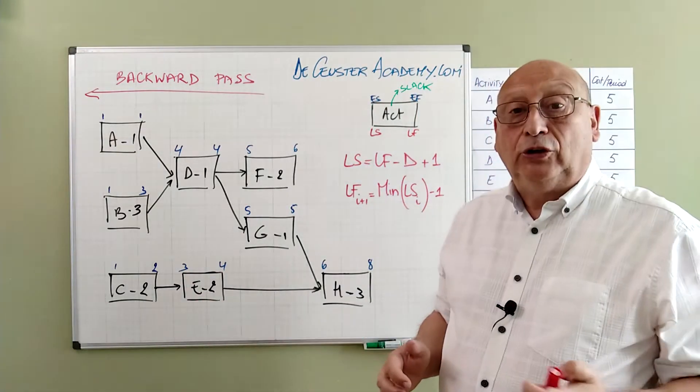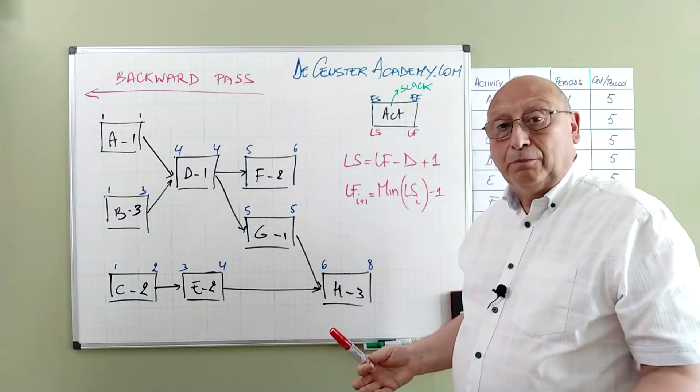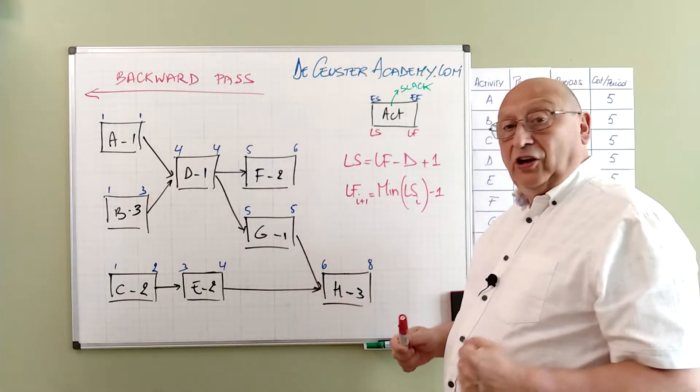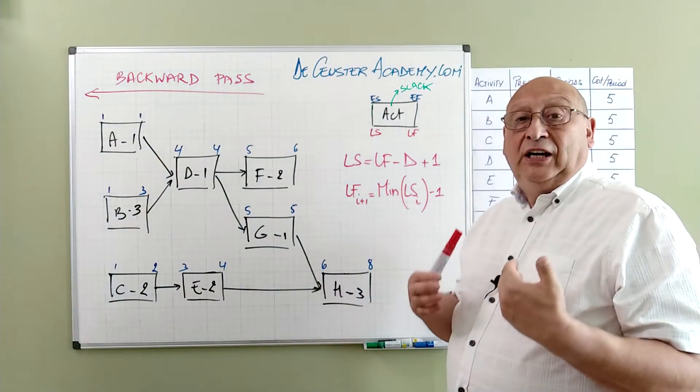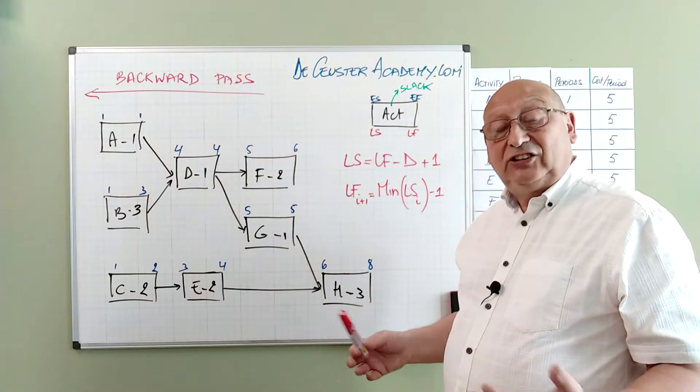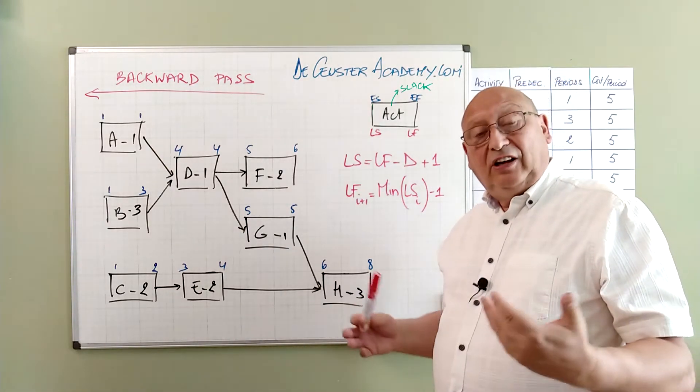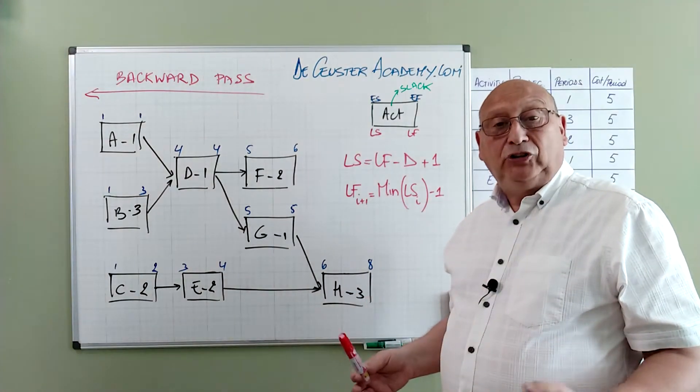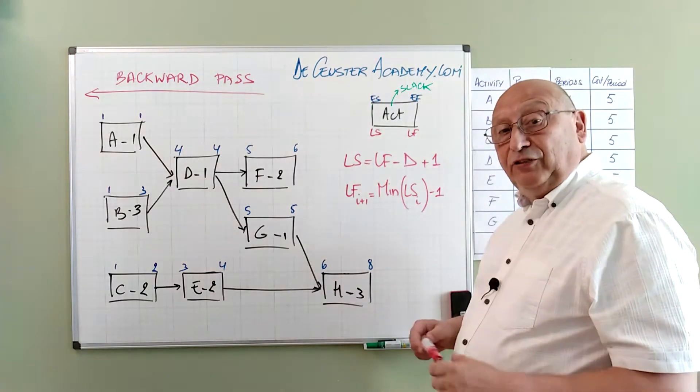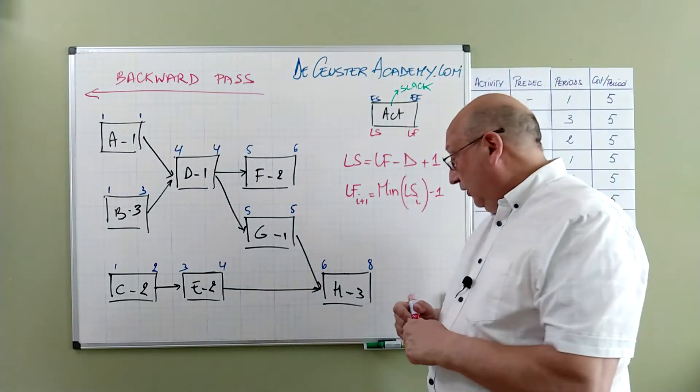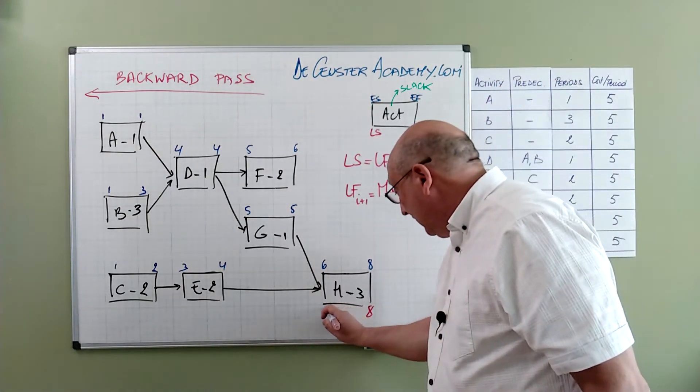Let's have a look at the formulas that we are going to use. The late start is the late finish minus the duration plus 1. And the late finish of the predecessor is the minimum value of the late start of all the successors minus 1. In our example we say that the late finish of the project is equal to 8. So basically early finish and late finish of the project are equal to each other. So we have 8. 8 minus 3 plus 1 is 6.